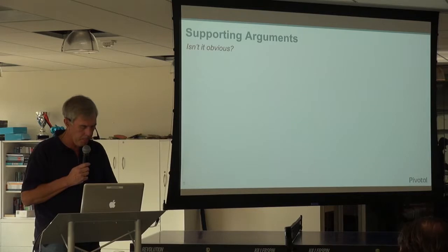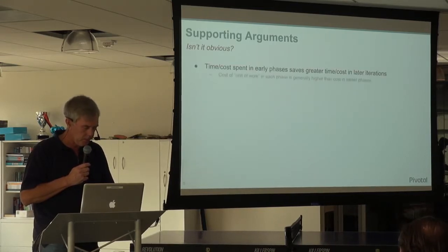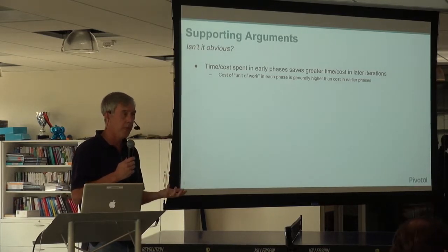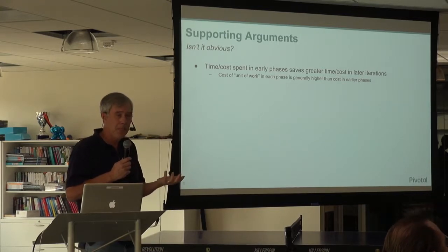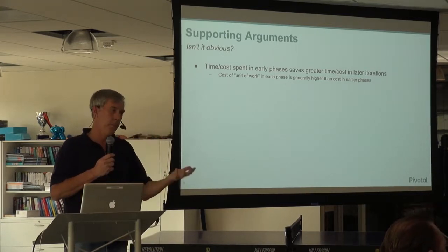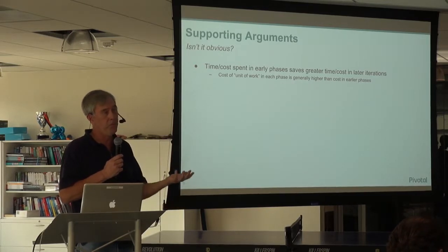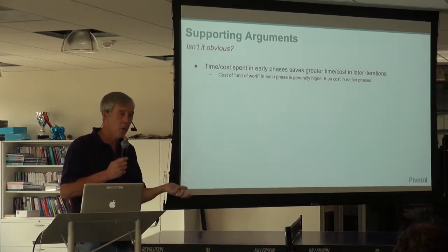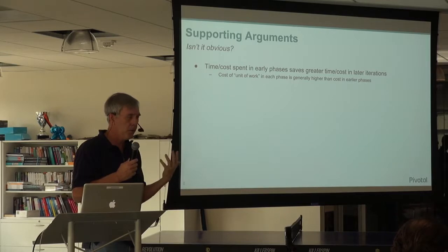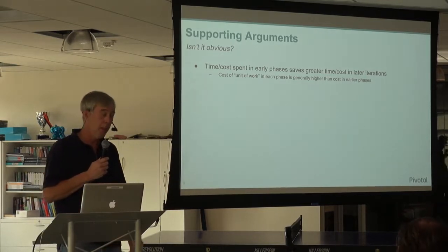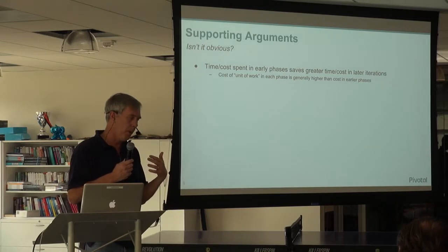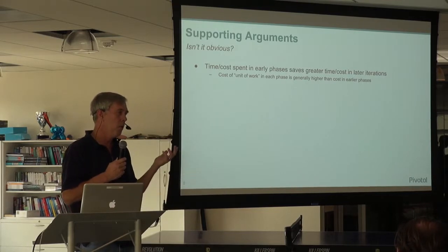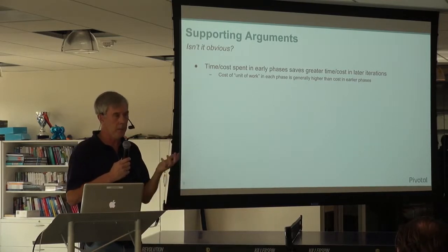So, what are the supporting arguments for this? The main thing is that time and cost spent in the early phases saves money later on. Certainly, if you're building a building, right? You decide what your objectives are for the building. You do a design. You have architectural drawings. Going back and changing the number of floors you have after you've built it is very costly. So that's sort of the mindset of the physical world plays into this. And certainly before we got better at it, costs were extremely high. Cycles were extremely high when you went from requirements to design to implementation.